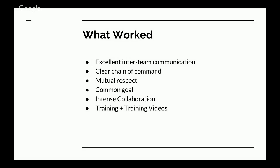And we did that really, really well. Another thing that worked was training and training videos. They asked lots of questions. We answered lots of questions. We anticipated a lot of the questions they would ask because of our experience. And then most importantly, we provided recaps and videos so that there was always a record, because the assumption is the person you're talking with now, in 5 years, is probably not going to be the same person. It could be, but it probably won't be. Those people can up and go.